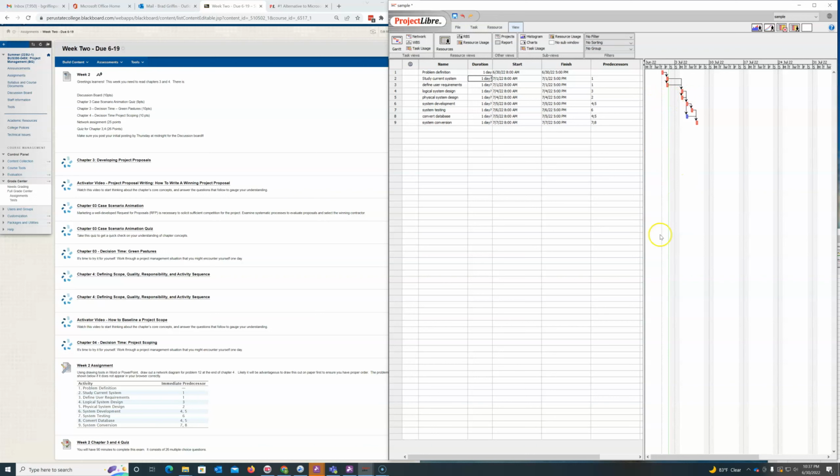Most places here we're looking at Monday through Friday. You can go in and block out holidays, so you wouldn't necessarily work on the 4th of July or those kinds of things. And in fact, it's probably already blocked out already for Monday.